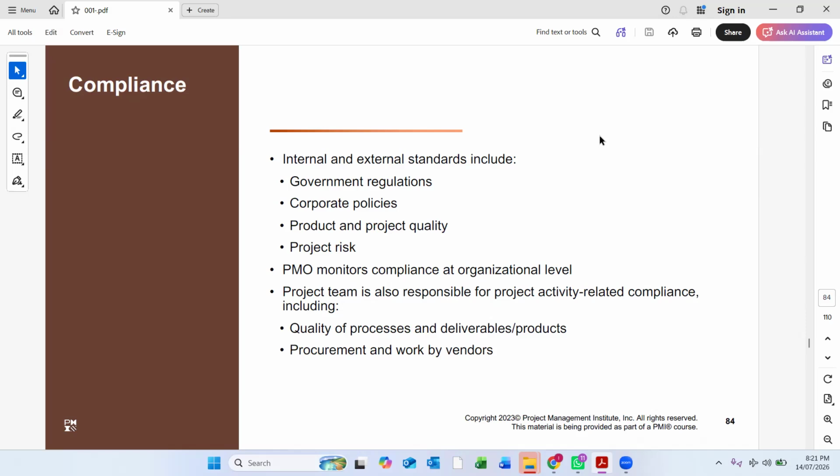And in the execution of work, there should be proper inspections. If there is some non-compliance, a proper NCR should be raised. So that is particular compliance in terms of a project. The project management office, who is monitoring the project side by side, should maintain compliance at organization level. This is how the compliance is being done on any particular project.